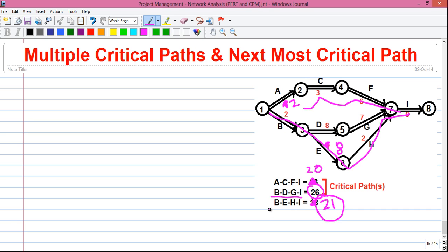And our next most critical path will be of next most maximum value. That is, 21. So that relates to B, E, H, I. So B, E, H, I will be our next most critical path.